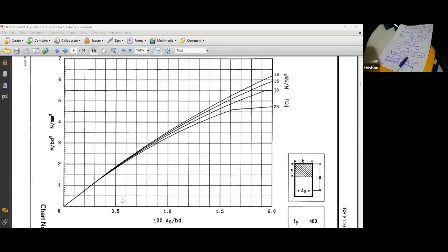That is a good way of thinking. Look at it. Okay, sir. So you have to educate the client. You can say, okay, you have a QA/QC department, and as the consultant, I will manage it. But I can't pay the QA/QC engineers. You pay, but I'll manage it, right? And for a small fee, or as part of my 1% fee, I'll manage it. But the QA/QC engineers' salary is your business.